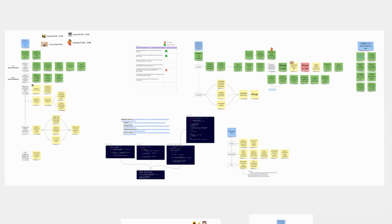One of those engineers is going to volunteer to be the valuable increment steward. In the FAST guide, they're called feature stewards, but I work with valuable increments on my team, so we call it the valuable increment steward. The valuable increment steward commits to seeing the valuable increment through from beginning to end. They're responsible for keeping up with everything that's going on with the increment. When somebody has a question about the increment, the valuable increment steward is the person to ask.